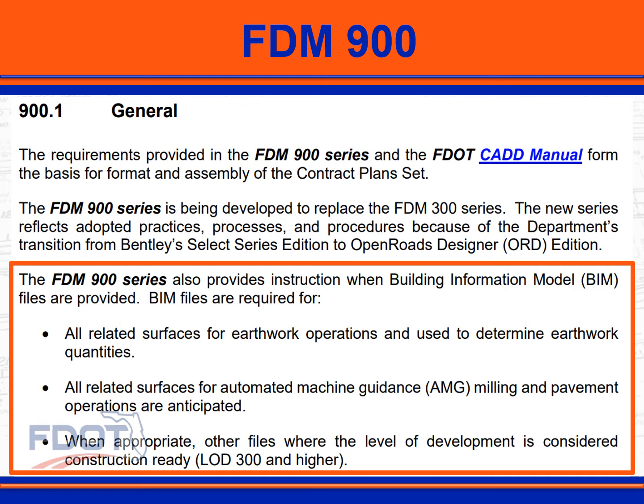Beginning with July 2022 lettings, projects developed with ORD or 2021 Civil 3D must deliver BIM files for earthwork operations. This is required regardless of how big or small the earthwork quantity is.